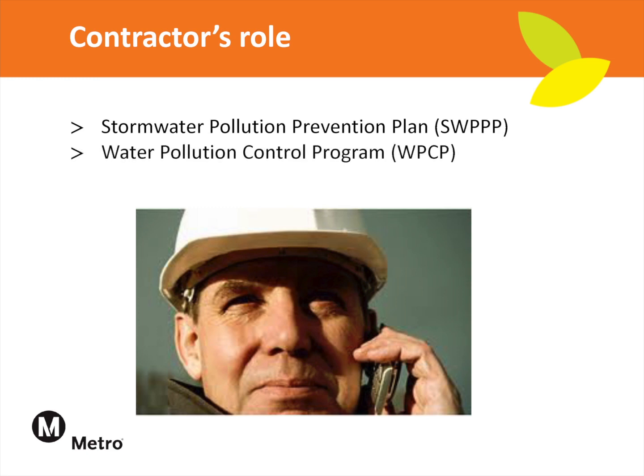This documentation is your commitment to using the best management practices available to control stormwater pollution and should align with Metro's larger permits. Your plan includes specific strategies selected, their locations, time frame, and implementation, and schedules for inspection and maintenance based on resources such as those found in the California Stormwater Quality Association handbooks and documentation. Either program must be developed and overseen by a qualified member of your environmental team.